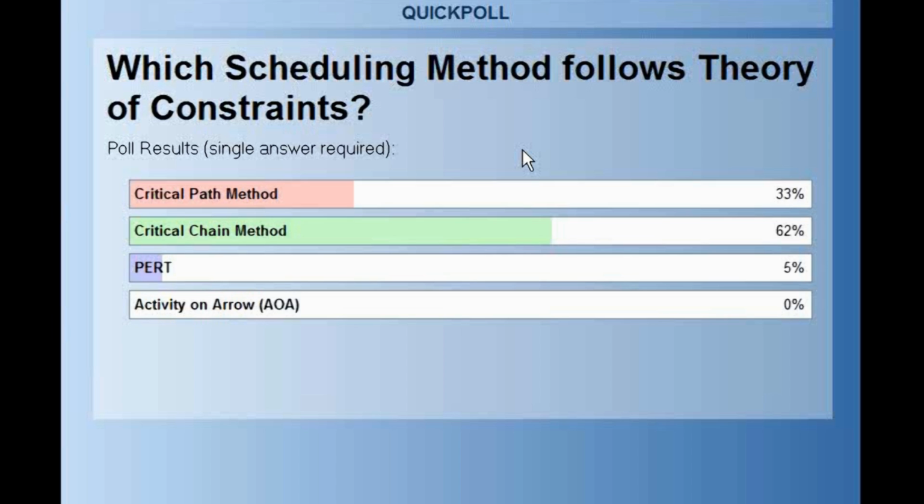The same goes for the project. The project buffers are a function of the amount of uncertainty we see in the project duration. The uncertainties are a function of how uncertain the scope is, and there are primarily two dimensions. One is called what and another is called how. What you have to make, how clear or certain you are about the scope, that's the what part of it.